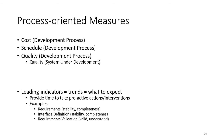Examples of leading indicators include requirements stability and completeness, interface definition stability and completeness, and validating how complete and consistent the requirements are. These leading indicators revolve around requirements definition because getting the requirements right — removing uncertainty from them — is the most critical step in the process. Any changes or defects that occur later in the process are much more expensive, so significant emphasis is placed on leading indicators of requirements definition.